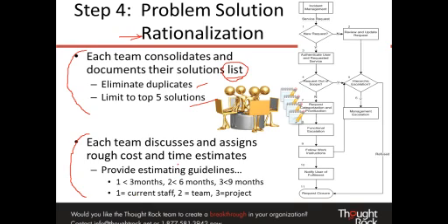So I get the teams to say, well, on top of the priorities of the pains, I want you to come up with an estimate. And typically what I like to do is cost and time. So give them some basic guidelines again. From a time point of view, is this something as a solution that can be done in 3 months? Is it within 6 months? Is it beyond 9 months? That gives me an idea about big, small, smallest.